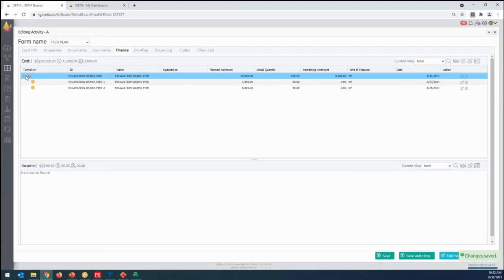And you can see the line items, which is planned budgets, and then on the 27 we have 20 progress, 28 we have a 40 progress. Its remaining cost is 8,000 and actual cost is 12,000. And this is how I'm tracking my contract items.